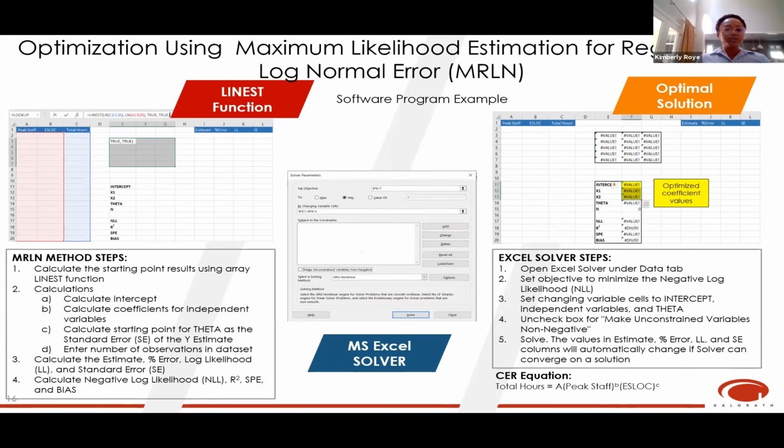This method is particularly useful since it minimizes the bias in the cost estimating relationship. And bias is how far the average predicted values are from the actual values. Models with high bias are typically underfit, which is a no-no because we are missing some of the true patterns within the data by using an oversimplified model. So just as models that are overfit are bad, we also don't want underfit models because we are just missing out on some of the information that our data is trying to speak to us.